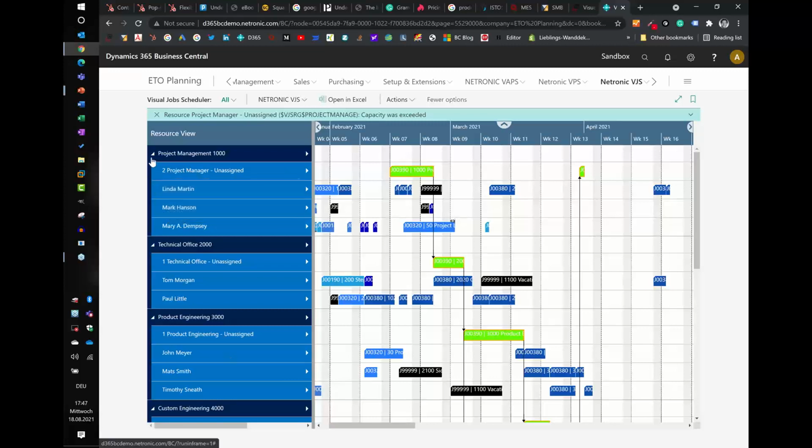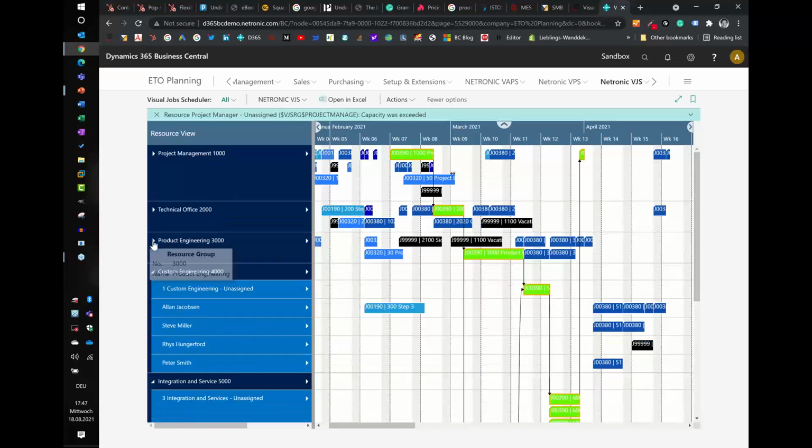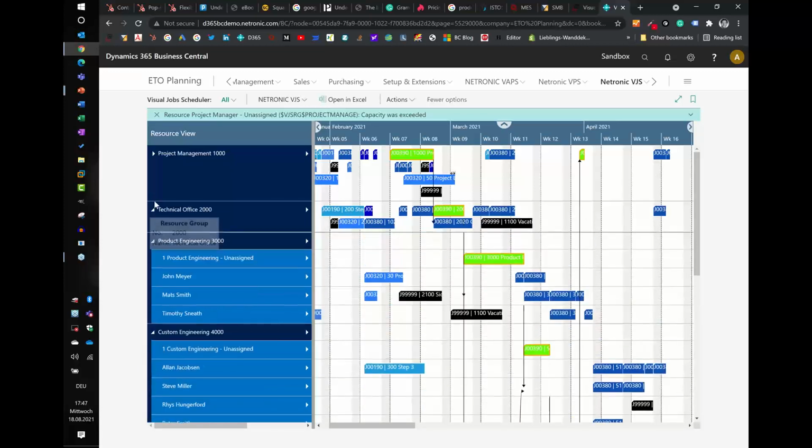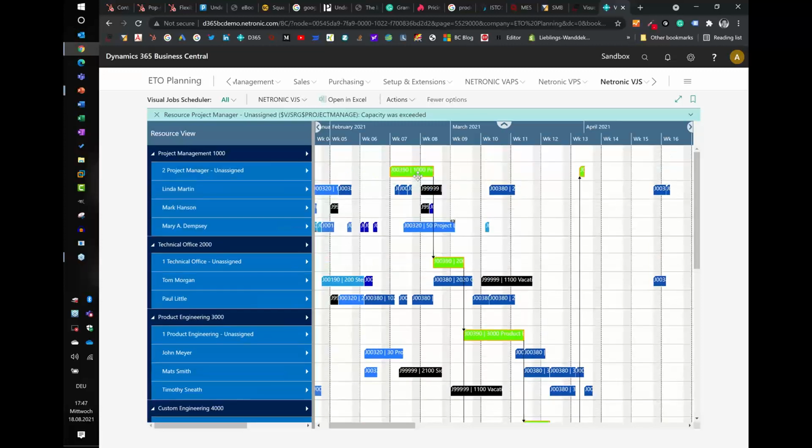So you see, I have my project managers here, I have my technical office, I have product engineering, and so on and so forth. And now you see these green boxes. This is my new project. And you see, I got a notification: the resource project manager unassigned capacity was exceeded.